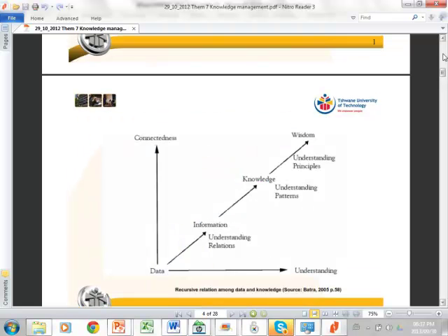That's why we manage knowledge, because remember this diagram where we had the data at the beginning. This is the level where the lessons learned lie. But if we haven't done anything to understand the relations and the patterns, to say this lesson belongs with electrical problems, this lesson belongs with civil problems. Do you remember with your first assignment, I was very impressed with a group that categorized the lessons learned and said that this was leadership?